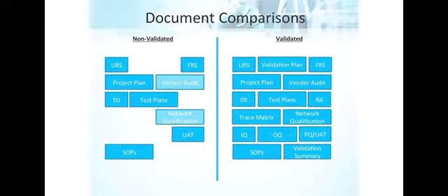Down on the left, about the fourth line down, where it says trace matrix. What's that? Some businesses that are not validated may have that, probably not from what I've seen. So a trace matrix, also known as a requirements traceability matrix, or a requirements matrix. In that document, you trace the requirements in the URS to the FRS. It could be one-to-one, one-to-many, or many-to-one. So here's this user requirement, and here are the one or more functional requirements that satisfy that.